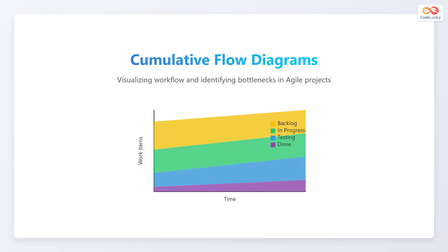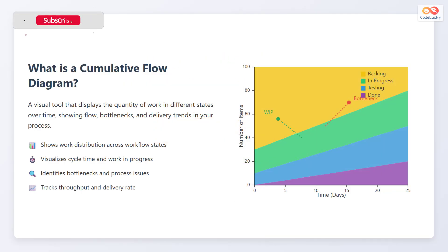Let's explore cumulative flow diagrams. These diagrams help in visualizing workflow and identifying bottlenecks in Agile projects. A cumulative flow diagram is a visual tool that displays the quantity of work in different states over time. It shows the flow, bottlenecks, and delivery trends in your process, work distribution across workflow states, cycle time and work in progress, and also identifies bottlenecks and process issues while tracking throughput and delivery rate.